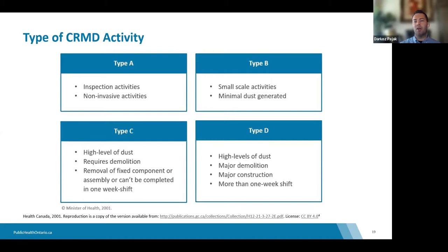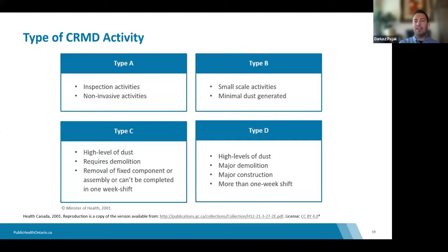For example, upgrading air conditioning systems might seem like a simple Class A activity — just popping a window AC unit in. However, older facilities may not have adequate electrical service, so wiring may need to be pulled, and windows may not be big enough to accept the unit, requiring additional modifications. Even an initially minor plan can escalate quite quickly, so it's important to stay aware of what's happening with an active project.